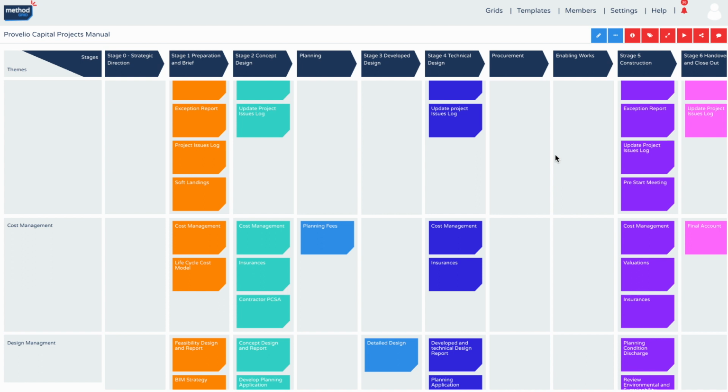Yeah, I think the key one for us now is just to show progression through. As distinct from a project plan, having the ability to look on a screen and see that on the project you're on, you have done the execution plan because it's greyed out, or you have done the detailed design, immediately gives a warm feeling to you as a PM, and transparency to the client and directors, that people can see progress through. So for us, the progression tracking is the key thing.